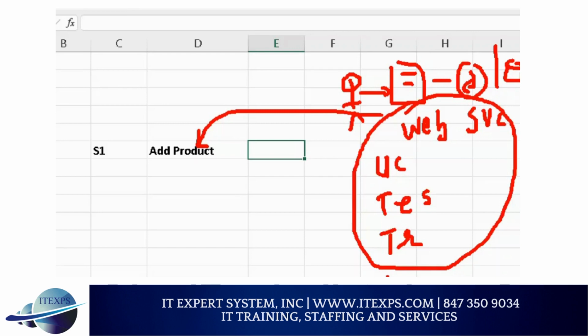This has to happen because when you estimated 1, you did not know the task. You did not know how complex it is. When you really do it, you know how much complex it is. At that time, you would say, oh, task is 40. But our common language says that 1 or 2 days, 2 people is 1 point. So it doesn't look like 1 point. It's more than 32. So I would say 2 point. This is the way estimations start happening.